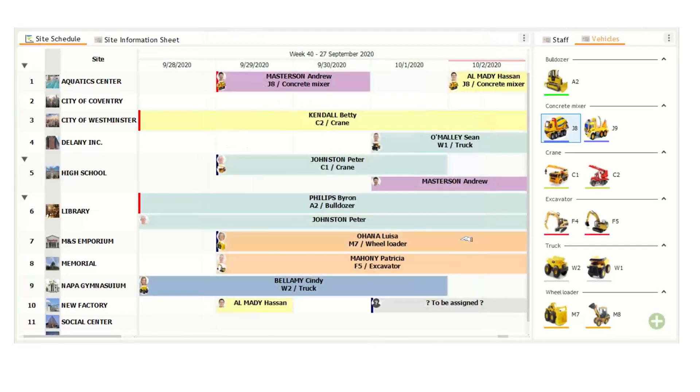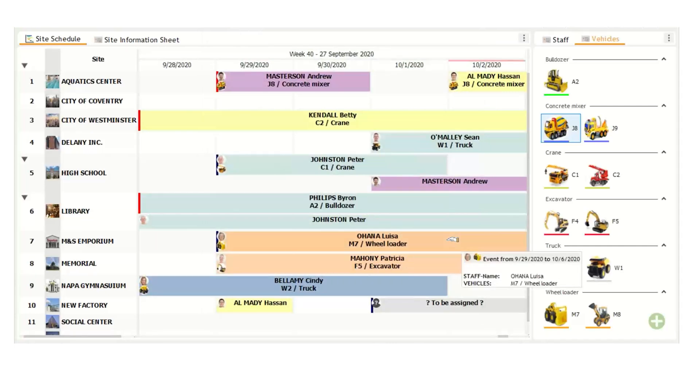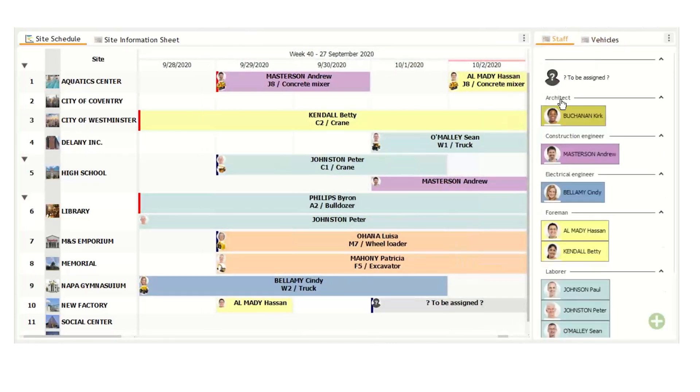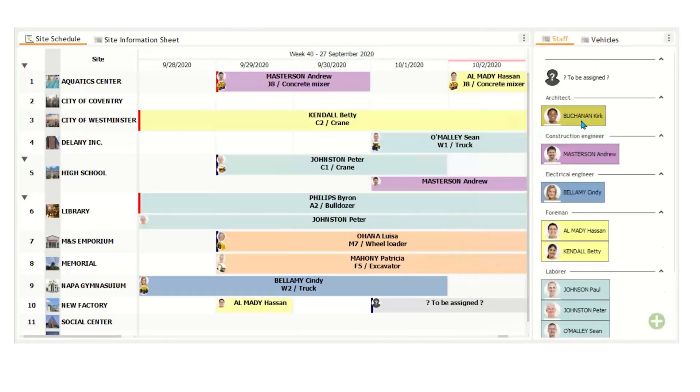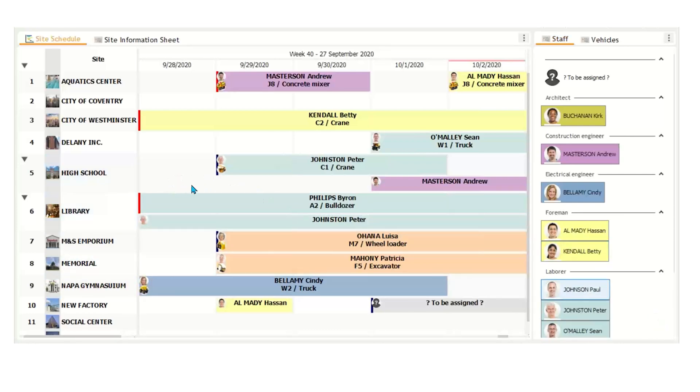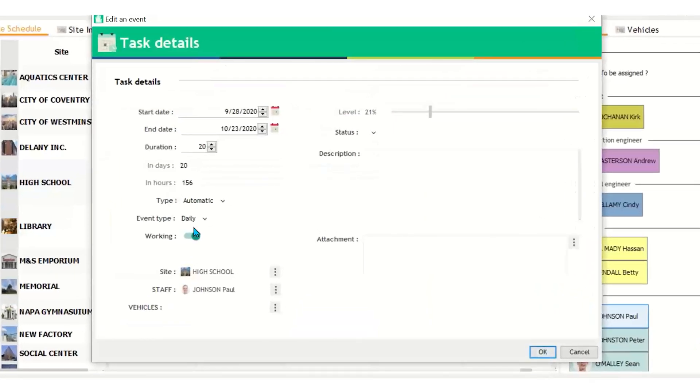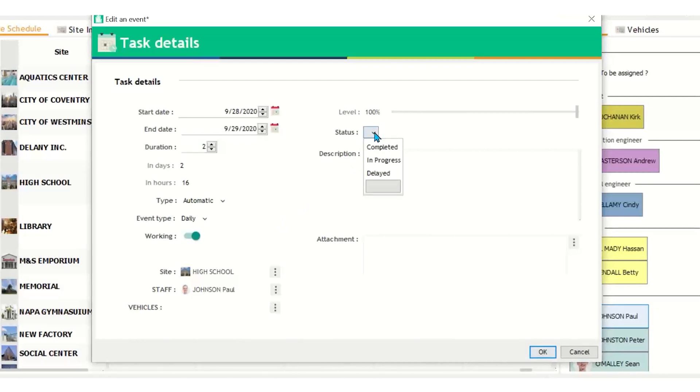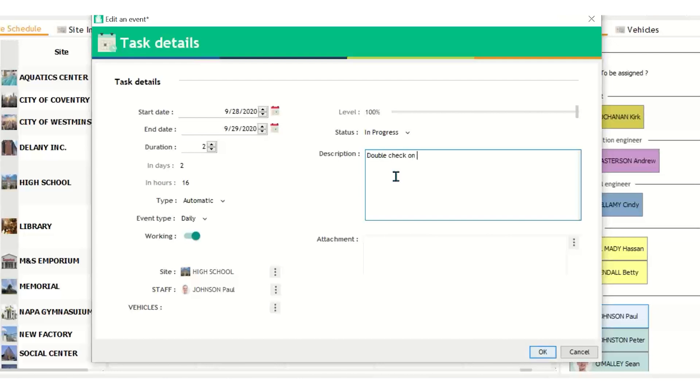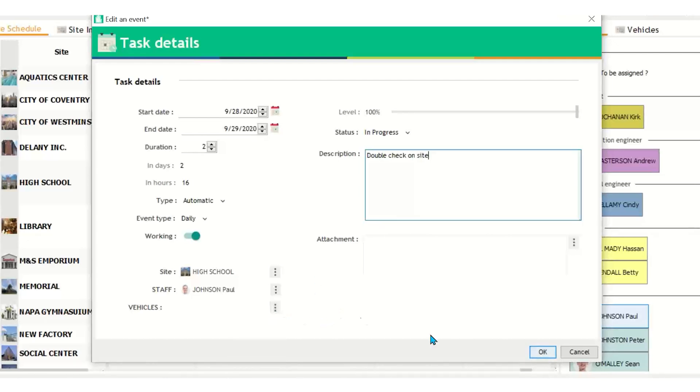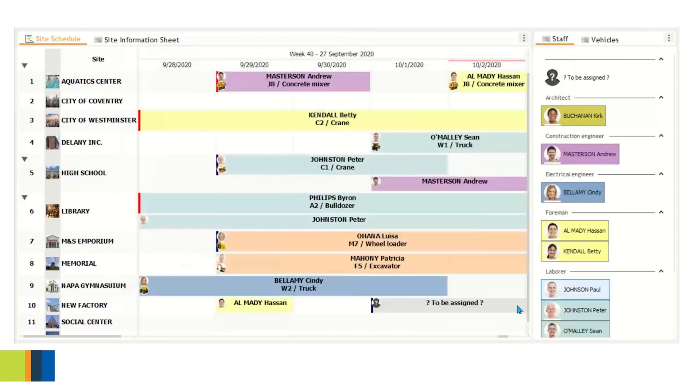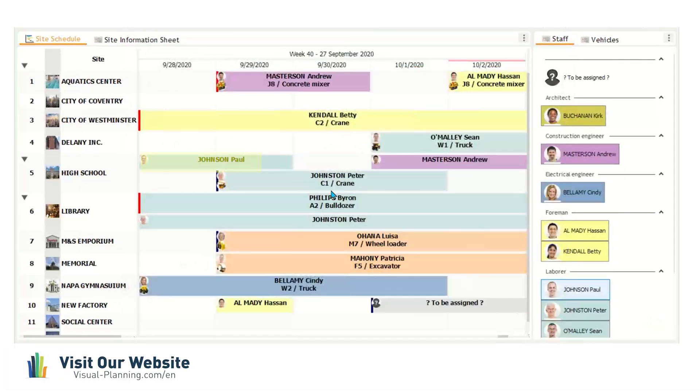Now I will show you how to assign a staff member and vehicles to a project. If I click and drag an employee onto a project, like so, let's say we're going to do Paul. Click drag, let go, and then a window will pop up. So here we'll specify how many days you want the project to be. Let's make it only two for now. We can pick a status, let's say it'll be in progress, and then a description. Let's say double check on site.